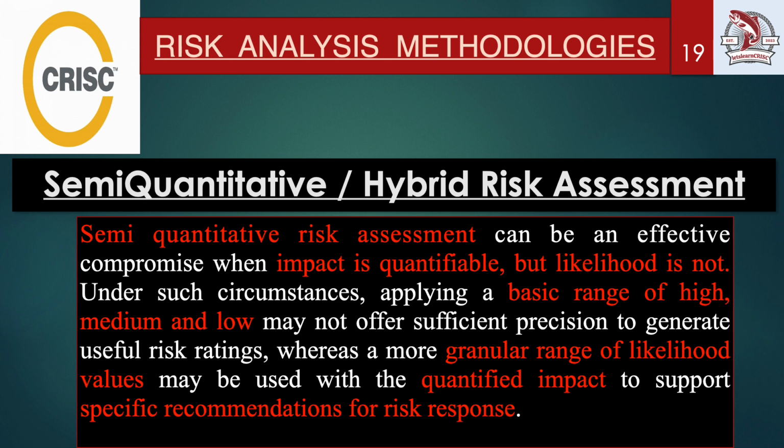May be used with a quantified impact. What is quantified impact? When the impact of a risk event can be measured in quantifiable terms such as monetary loss or operational disruption, it provides a solid basis for analysis. To support specific recommendations for risk response. Friends, by combining the quantified impact with a more detailed likelihood assessment, the semi-quantitative approach can provide a more nuanced understanding of the risk. This in turn supports the development of specific recommendations for how to respond to the identified risk. Right? Let's understand it with the help of an example.